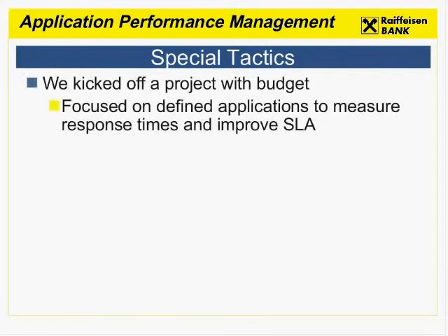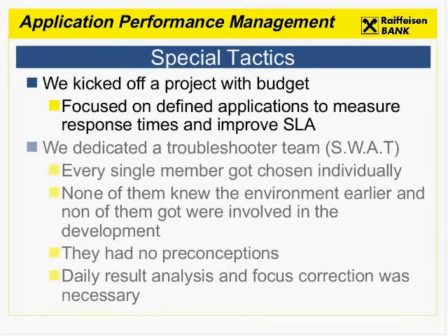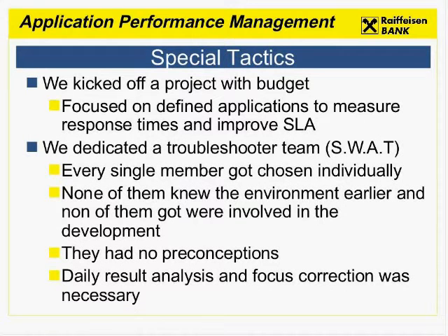How did we try to solve this? We kicked off a project with a budget, and focused on defining with which SLA and which response time we would like to reach. And we decided to solve this human factor. We set up a SWAT team. There were some criteria for the SWAT team. I wanted persons who were not involved in the development earlier. That means they have no preconceptions about the system.